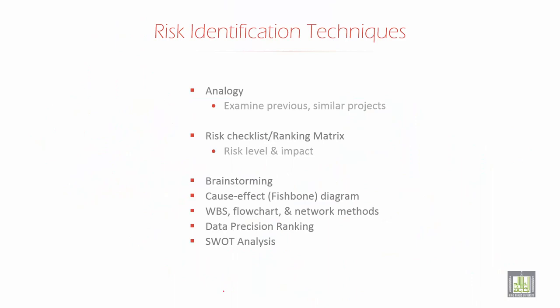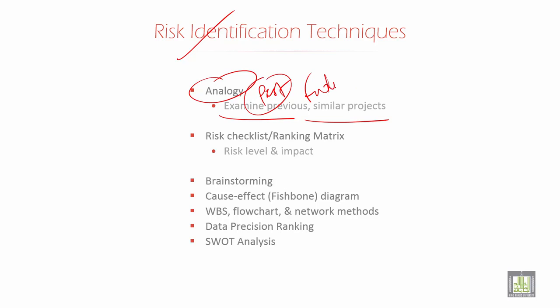Then you have risk identification techniques. Analogy is a comparison. You have to compare by examining previous, past and similar projects. So this is an identification technique. Like for any accident, it compares with the past, with the previous one, how it happened, and whether it happened by the same cause, like repeating the same mistake.